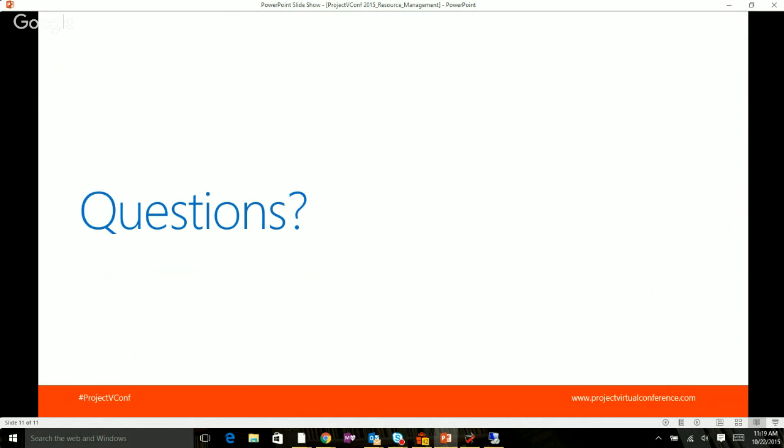Okay, Eric was asking what would be a reason to use 2 different settings in one resource pool, where some people need engagements and some people don't require engagements. Why can't everybody require engagements? We were really leaving it up to the organization if they wanted to require them or not. It could be potentially that you don't require them for the people in the accounting department, but maybe you need it for all of the construction crew, something along those lines. You could bulk edit and require it for all of your resources. So if your organization is comfortable doing that, that's an option too. You can make it the same for everybody, but if there was an organization that wanted to require them for some resources and not others, we wanted to leave it flexible.